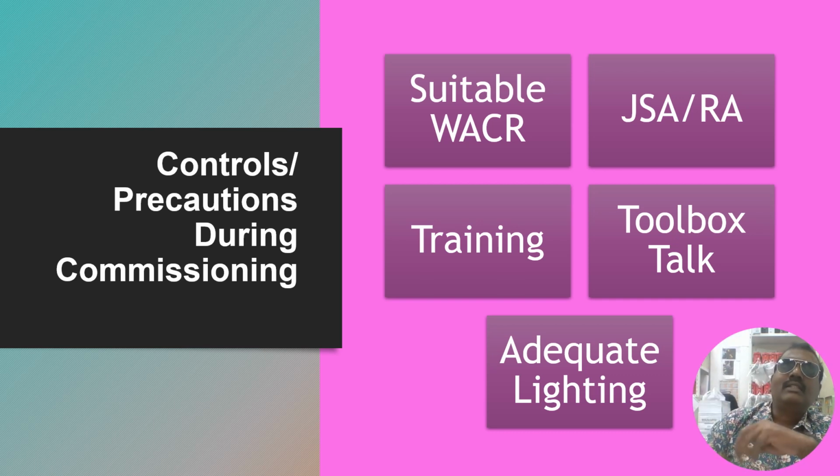So it is a separate subject. This WACR is a separate subject. We have a separate training program for that. So along with this WACR, what should be attached? A JSA, training details, toolbox details, and adequate lighting.